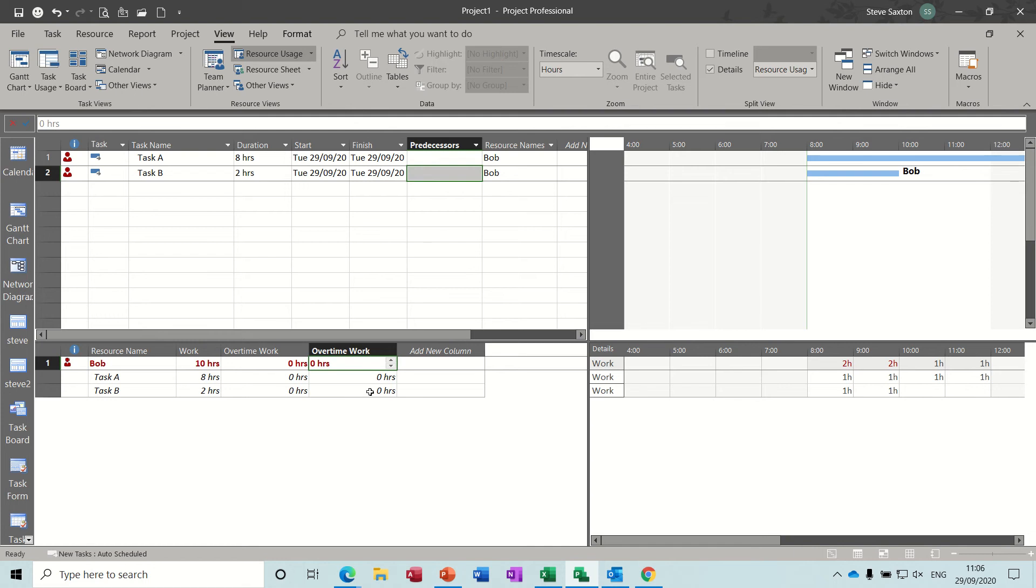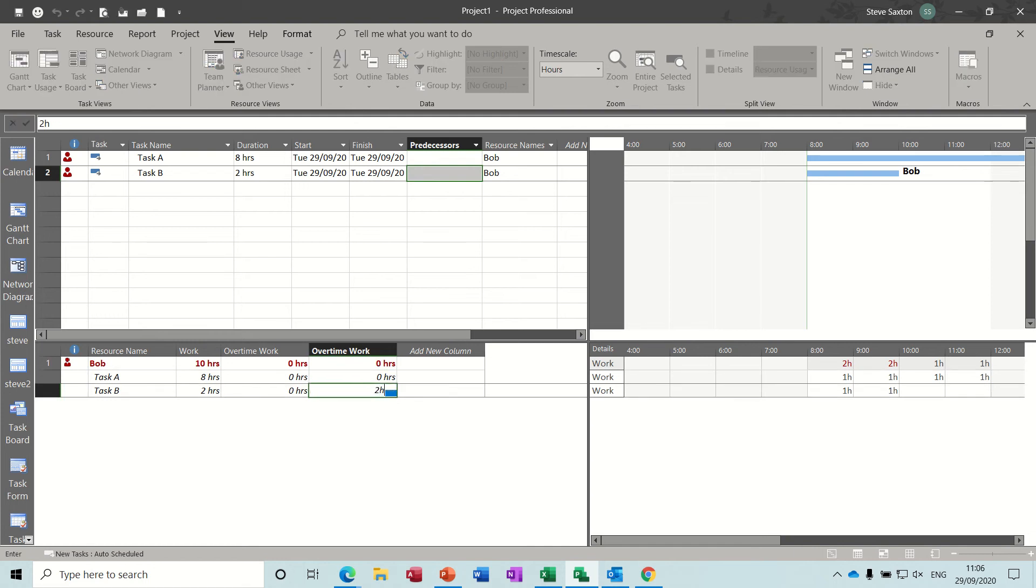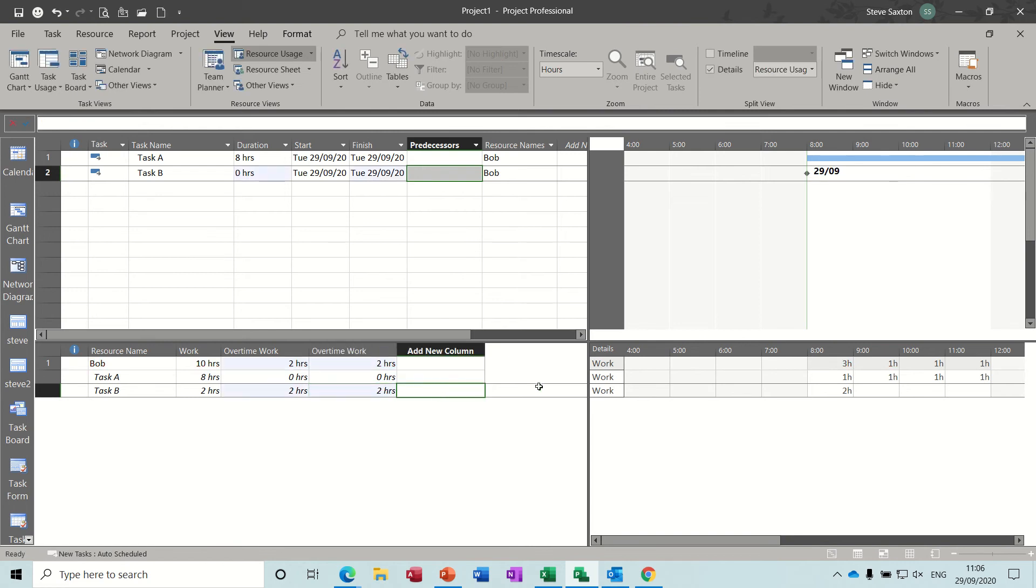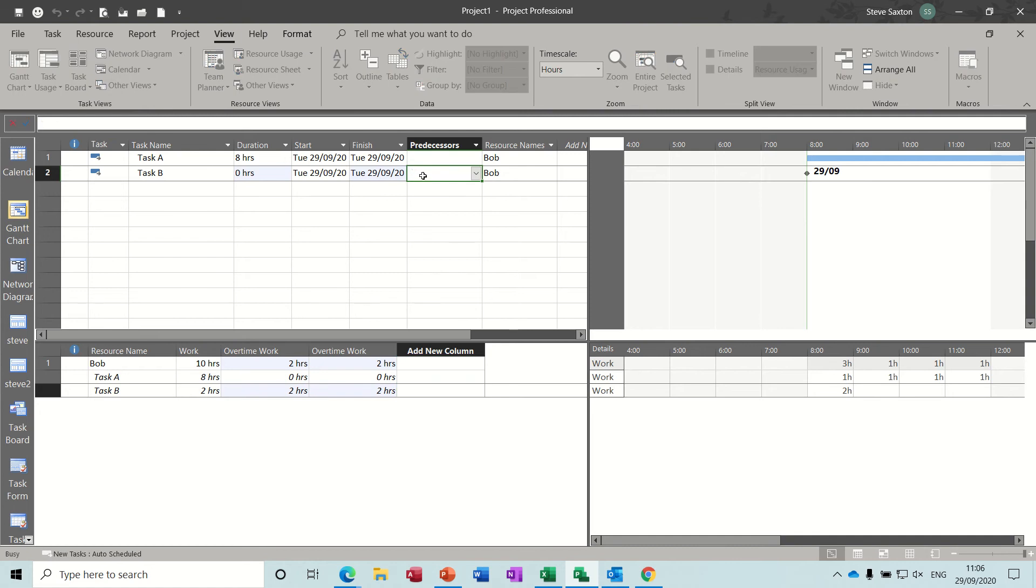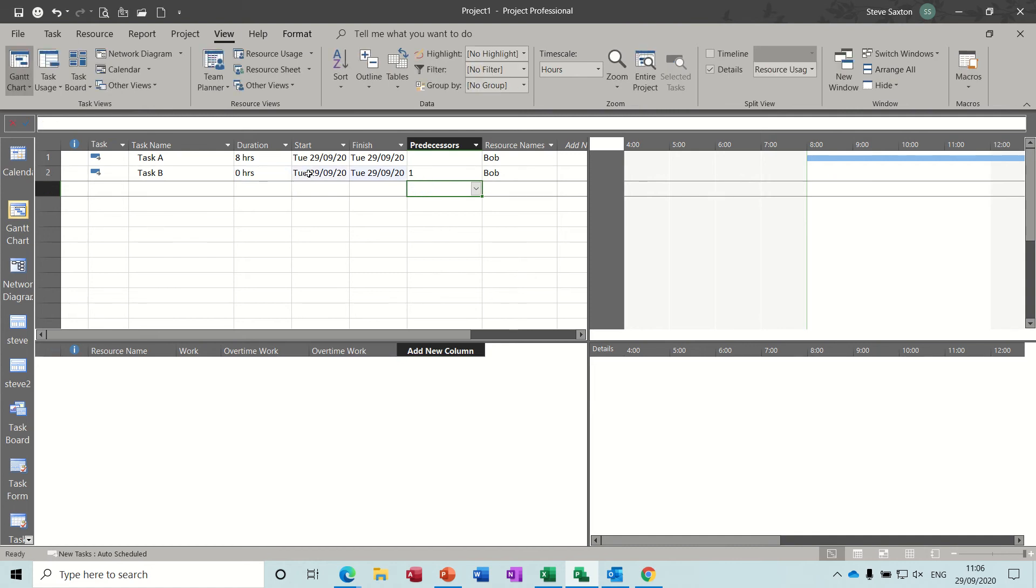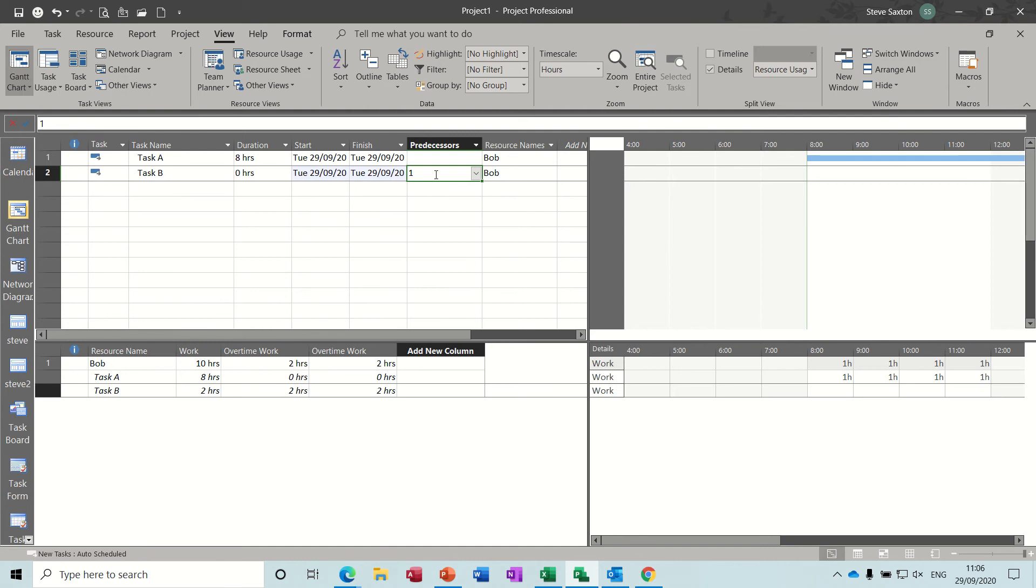And then you give him two hours overtime on that task B, which will then allow it to all take place in the same day. And if I put a link there, it still stays on the 29th. It hasn't gone on to the next day.